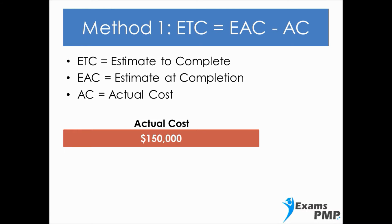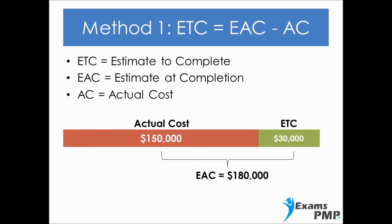Let's look at an example. Suppose your project has already used up $150,000 and your boss walks in asking how much more money is this project going to take. What he's really asking you is for the Estimate to Complete. At this point, you pull out your EVM spreadsheet and notice that the Estimate at Completion is $180,000. By plugging in the AC and EAC values into the formula, you determine that ETC is equal to $30,000, which means it would take $30,000 to complete the project.